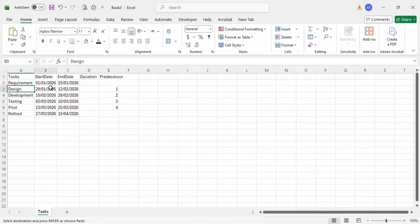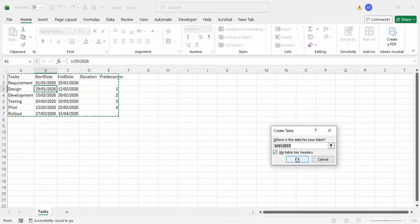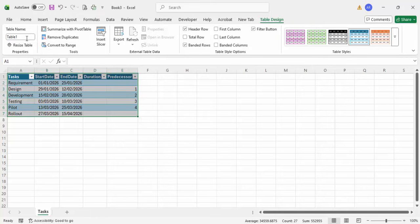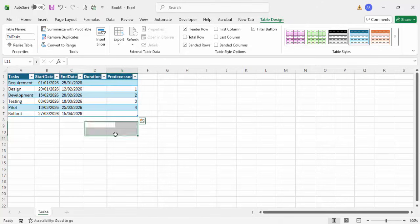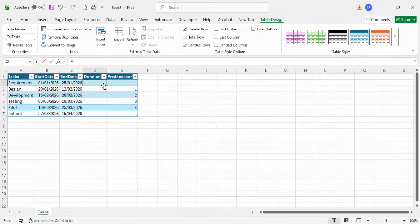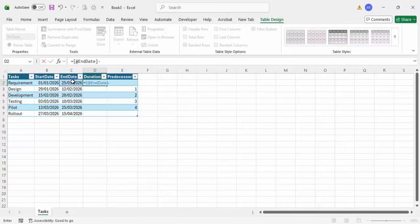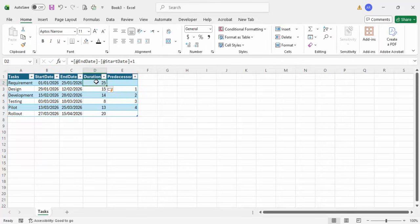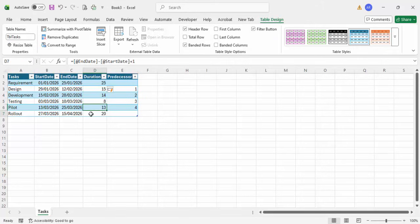Once this is done, the next very important part is to convert this into a table. Place your cursor anywhere, then press Ctrl+T. It will confirm that your table has headers — click OK. It converts into a table, and you have to rename the table. Instead of 'Table1', go to Table Design and rename it to 'TBL_TASKS'. Now we can add a simple formula for duration: set it equal to end date minus start date plus 1, and press Enter. You can see the duration: 25 days, 15 days, 14 days, 8, 13, and 20 days.